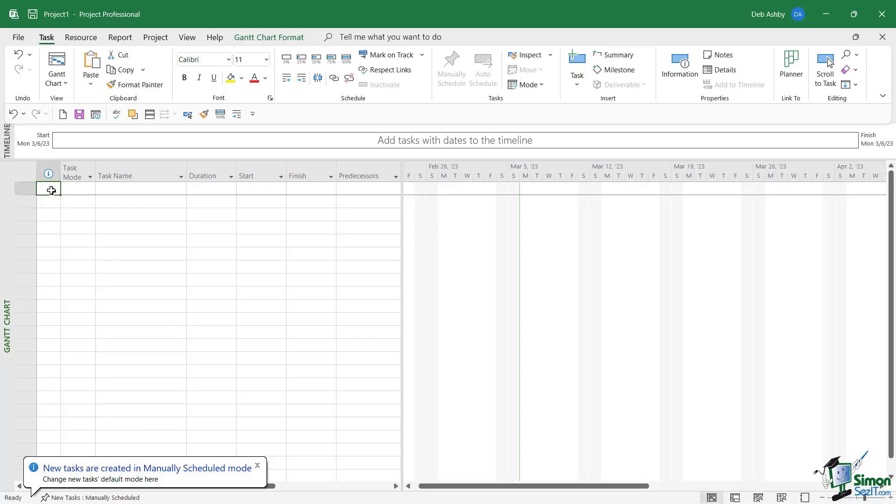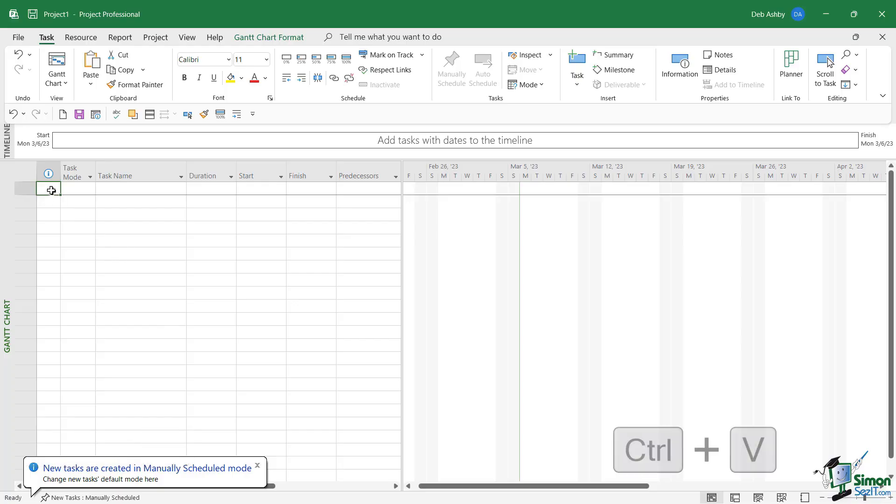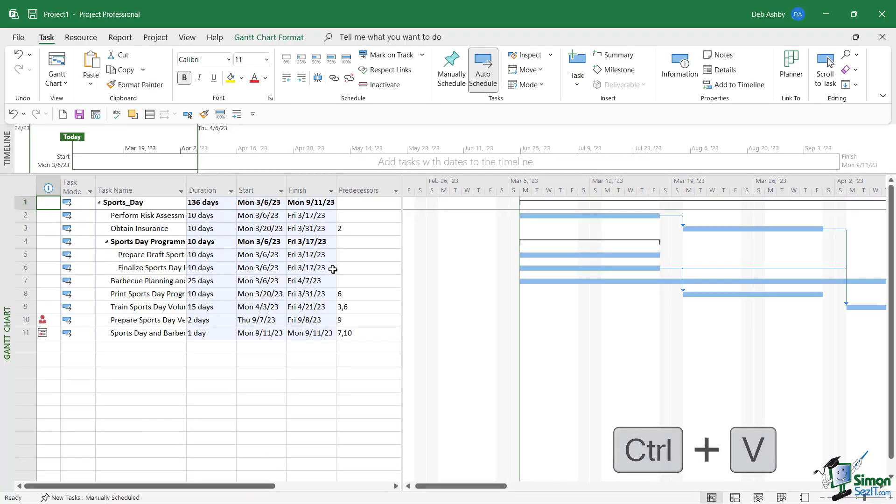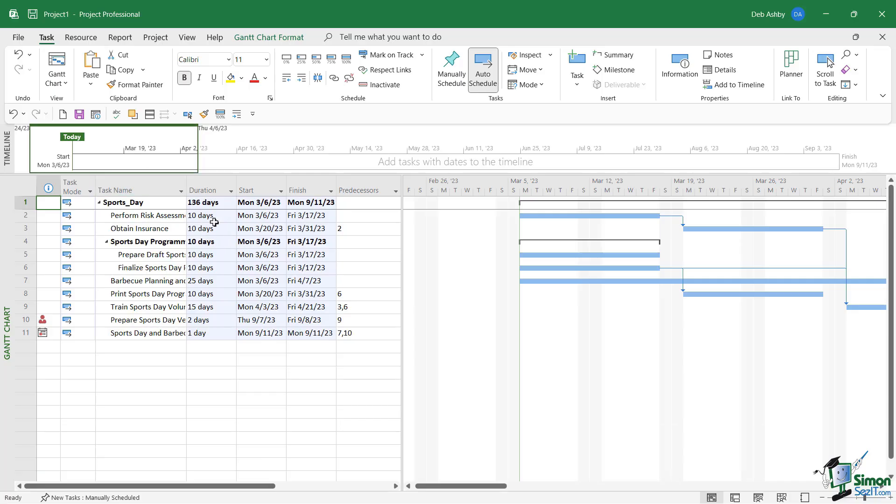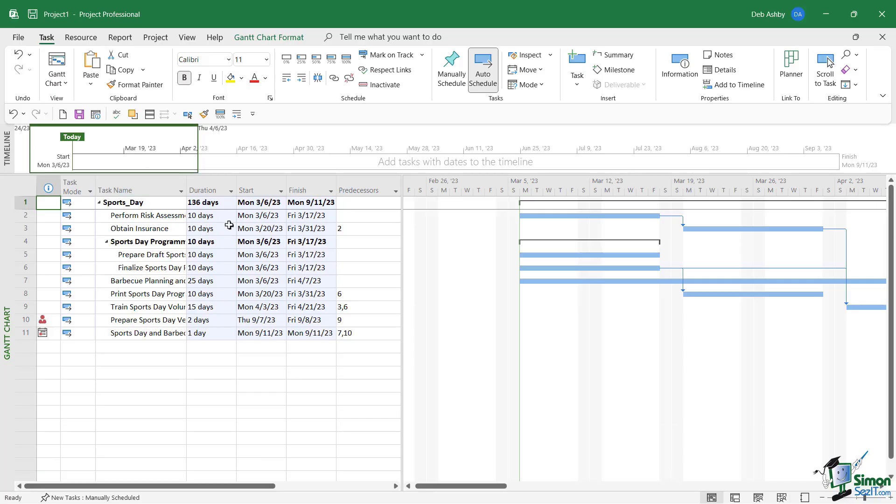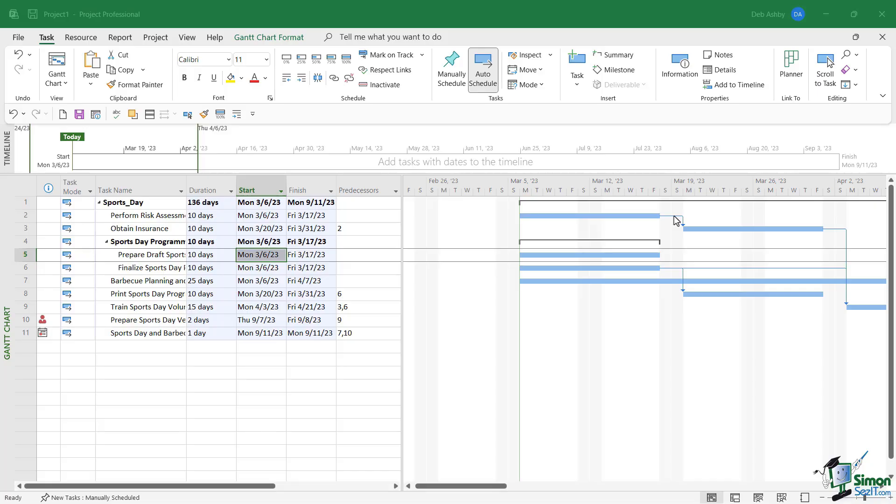sports day tasks in this new project. Now once you've copied these tasks across, it's worth noting that those dependencies still exist within this summary task. But remember, in the original version of the project plan, this sports day section also had dependencies in other parts of the project, and those haven't come across when we've copied these tasks.